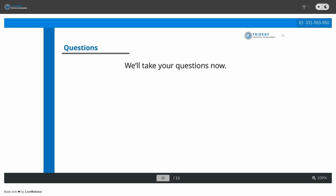It's where we're really now reevaluating our stance on the acquisition. Two, maybe funding isn't quite there yet. With some agencies, they have to fund before an acquisition can be released or an RFP can be released. So maybe there's some issues with the funding. There's so many reasons. Maybe the evaluators' timelines, just someone's on vacation, someone's not available. Maybe the KO is away.